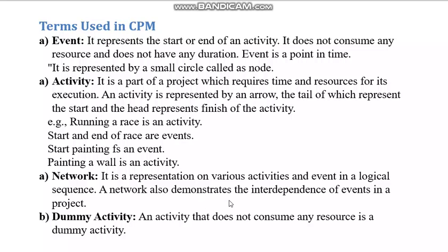If there are a number of activities, certain things depend upon others. Like if you want to lay the foundation, first earth should be dug, pits should be made. Okay, that is a dependence. See, you cannot lay the foundation till the digging is completed. Okay, so there is an interdependence or prerequisite. Okay, or there is something called precedence.